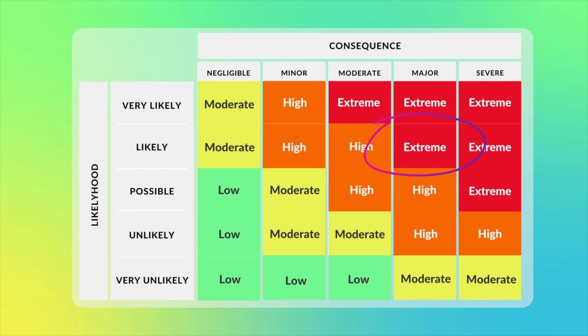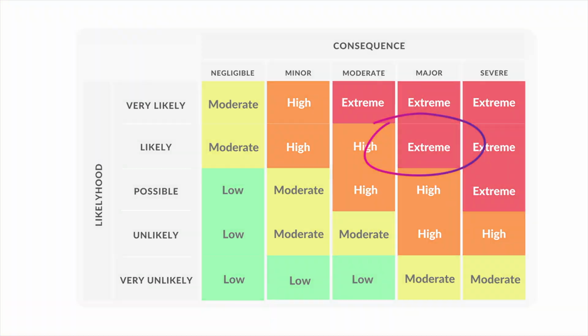So how would a project manager go about assessing risks? The project manager and stakeholders discuss the risk and review the likelihood and consequence. The likelihood in this case is likely because the vendor has a history of failed deliveries and the team has assessed the status of the component as behind schedule. And the consequence is major because a 4-week delay would mean that the project misses the planned release and it will impact future work. The inherent risk rating is then extreme. In most organizations, extreme risks are unacceptable. So there is now a clear need to develop a mitigation plan and reduce the risk.